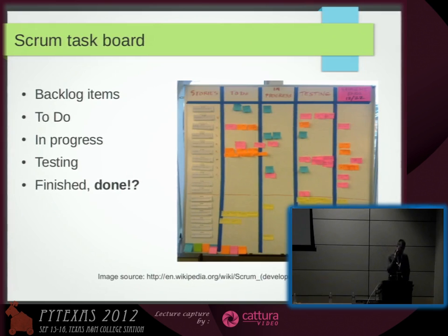Again, I put this finish done here and I just want to throw some terminology at you, but it's very important regardless of Scrum or any other software development. In Scrum, there is something called definition of done, which means that the team internally has to define what done means. The first rule is that done means done. Okay, so if it's done, that's what you asked. Everything has to be done. Integration, testing, acceptance, everything.